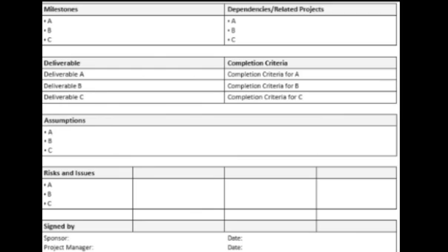1 week. Now, one thing that is peculiar to this milestone is that you don't just write down 1 week. You have to state when this 1 week will start and when the 1 week will end. For instance, you can say to deliver the foundation of that house to DPC level is going to take 1st of June to what? 7th of June, which is the 1 week. So you have to state when the 1 week will be starting and when it will be ending.